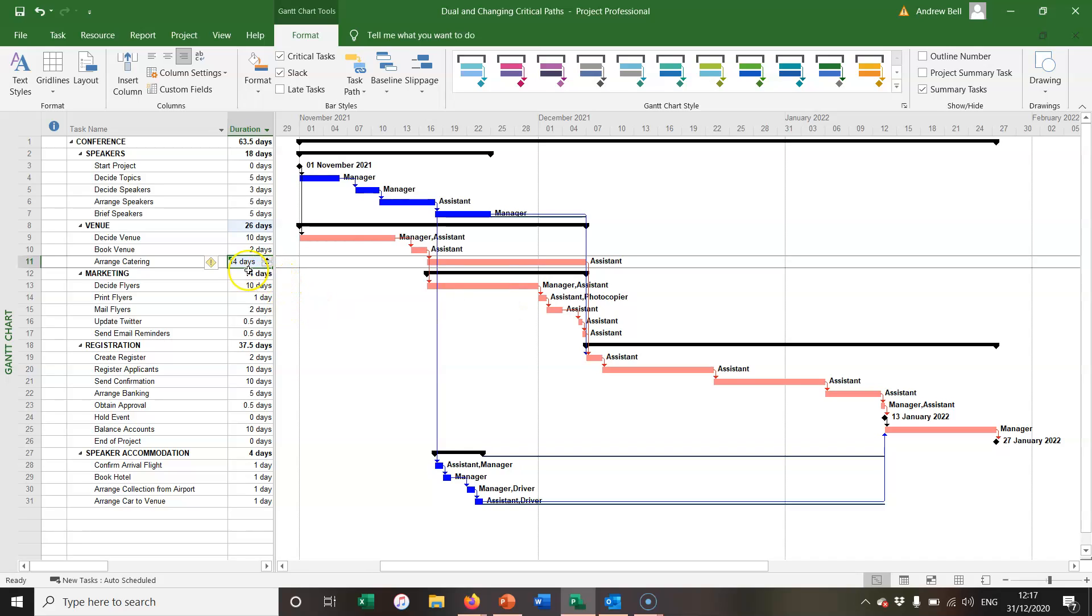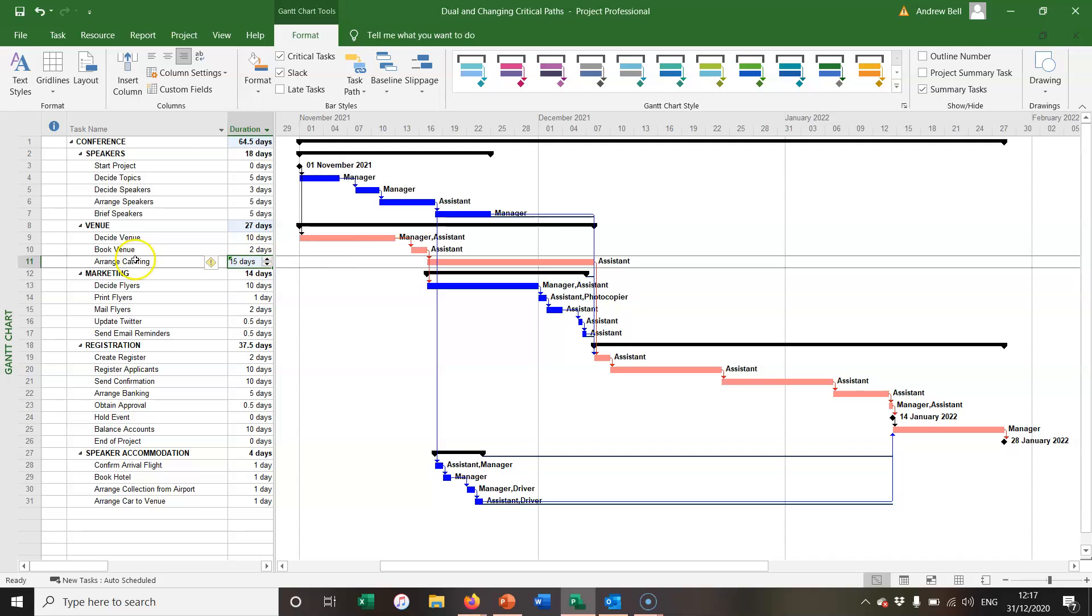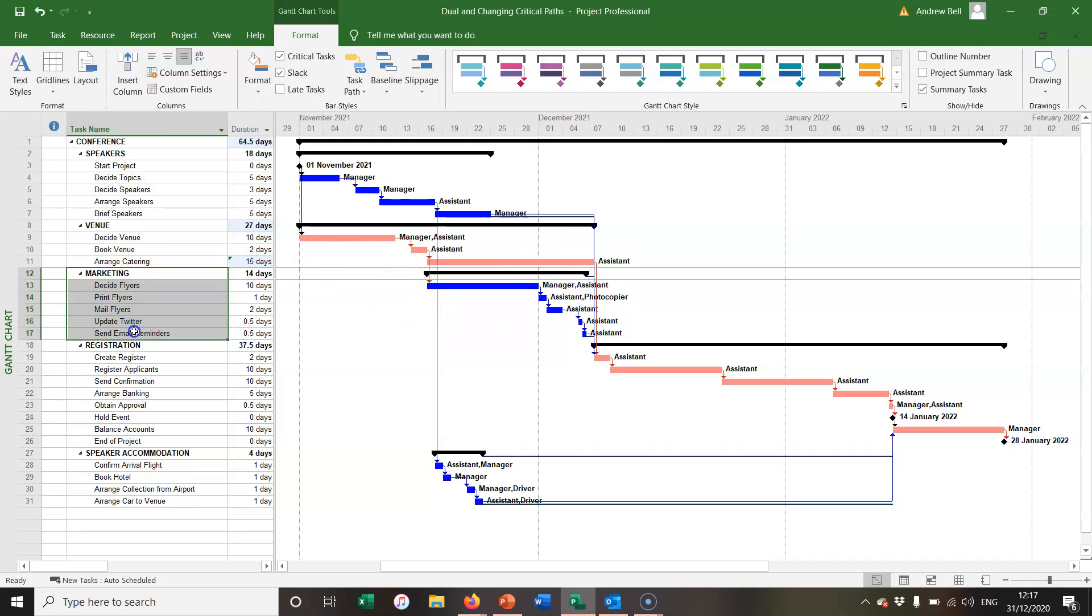Of course, if I increase the duration by a further day, then the arrange catering is critical and now none of the marketing tasks are critical.